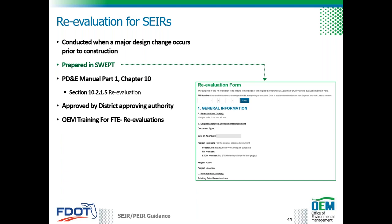Before heading on to the next lesson, let's briefly go over reevaluations for SEERs. Reevaluations are necessary for design changes resulting in new or additional impacts, which may require agency consultation or new public involvement, and for project changes due to changes in law, the passage of time, or changes in resource or issue status. When advancing to the right-of-way or construction phase, a reevaluation is needed if it's been longer than a year since approval of the SEER or the last reevaluation. Reevaluations are now prepared in SWEPT and approved by the District Approving Authority.